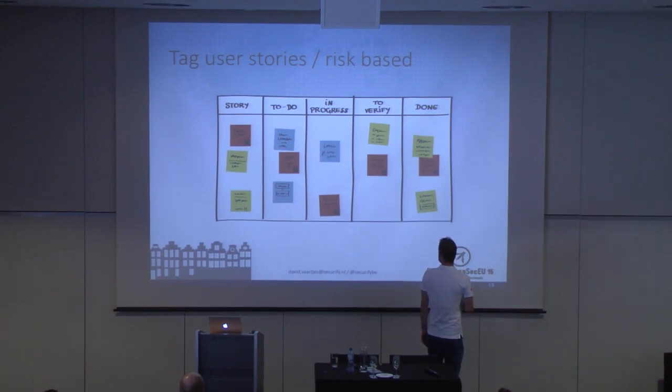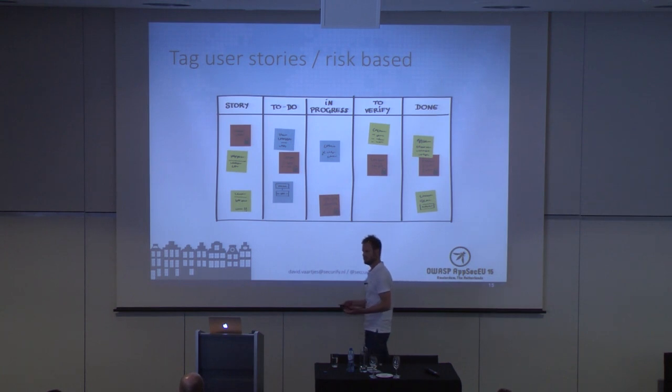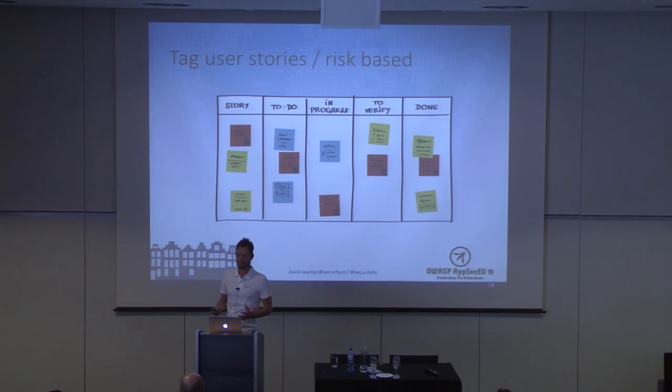So this actually worked pretty great. So we were able to get from 10 or 20 user stories to maybe 5, 6, or 7, which were really security relevant. There were sprints where we couldn't find any security relevant change, so they just got to go live without any additional assurance from us. So this is really great. This really sped up this entire pen testing thing.